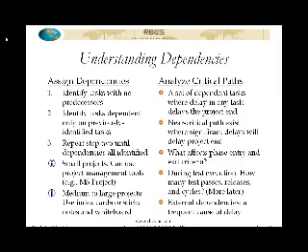Okay? Now you can also have near critical path tasks, which is where there's a dependency with a task that's on the critical path. Now currently the way it's scheduled, it's going to be done 3, 4, 5 days before the critical path task starts, so it's not going to have an impact, but it could if it slipped enough. So we want to look at those because that's another source of risk. Anything that could delay a critical path task is a project risk, because that's got potential impact on the end date for the project.